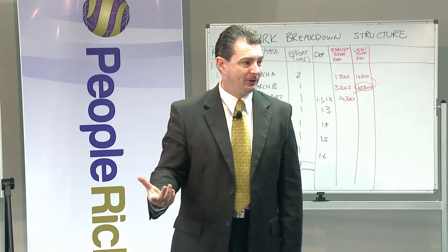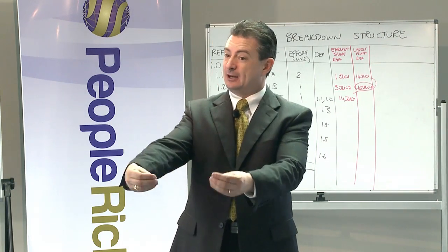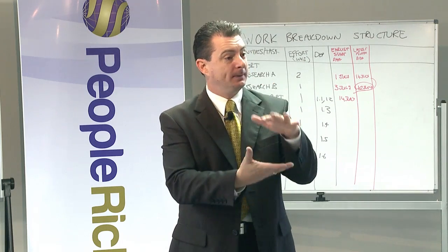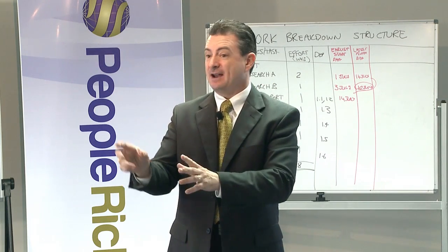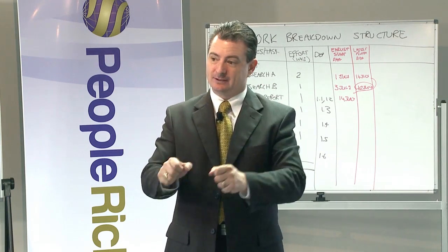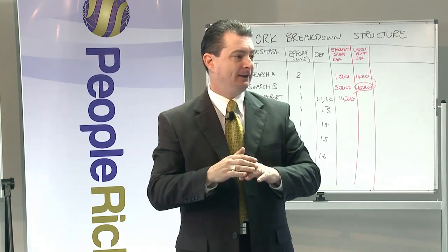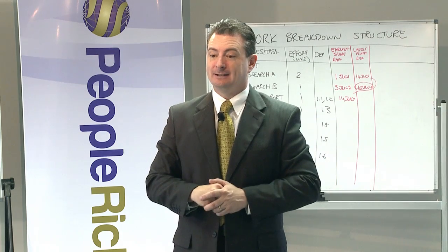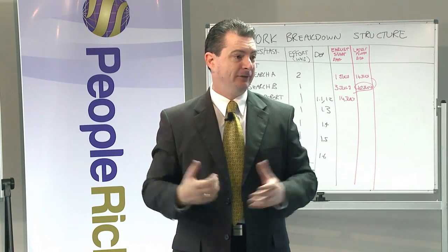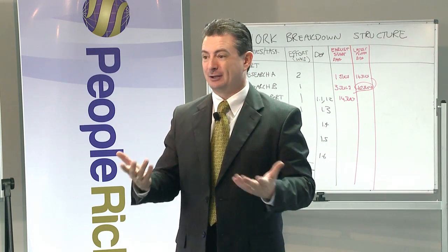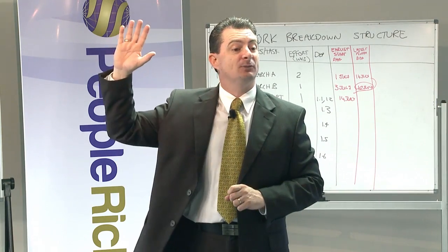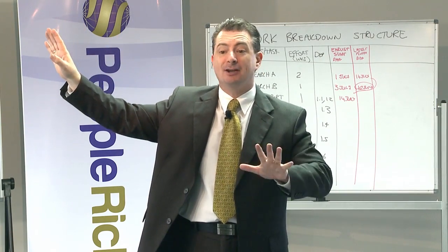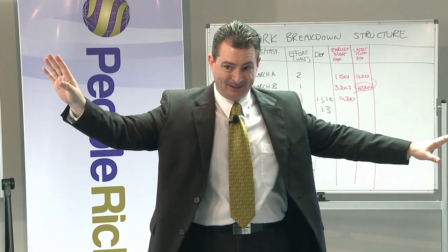So then I said to the person, we can see that we could take that away. That would reduce the scope, but you'd save 3 weeks there, and you do this, you do that. And they then decided, and they got it down to 7 months. But do you reckon that's a better strategy than saying yes and then trying to deliver it in 6 months and not get the quality? So who makes the decision? Well, it's the project sponsor. The project manager is just the person that oversees it all getting delivered.